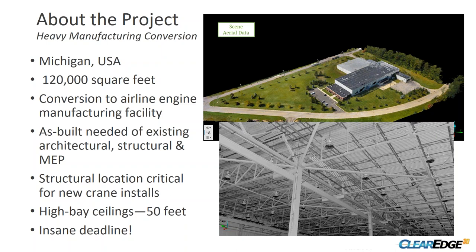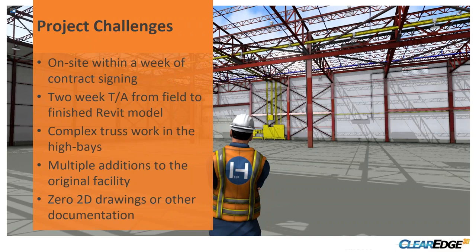And then to top it off, not only did we have to be on the site really quick, but they also needed a quick turnaround, so inside of 2 weeks. So some might say that's an insane deadline. So we were on site within a week. 2 weeks from that point, we were to go ahead and try to deliver that Revit model for them. We had an initial bag to get them started on some very initial work that they started inside of a week, but then we had to complete things done within another.